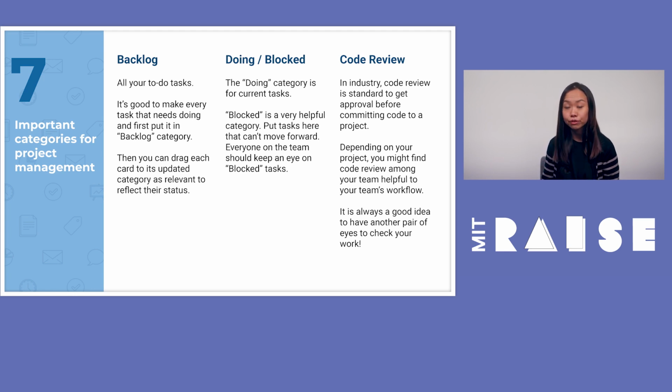Blocked is a very helpful category. I really like to talk about blocked because this is a way that you can communicate with your team members when something can't move forward. Everyone on the team should keep an eye on the blocked tasks because this is a way that you can communicate, I'm working on something that now I'm blocked on and we should talk about this.